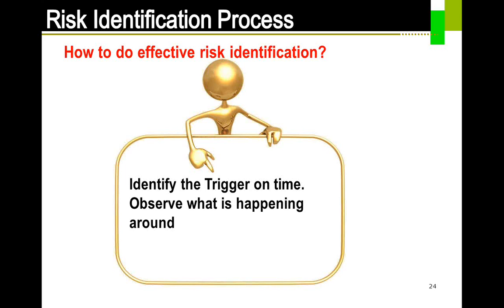What I mean by schedule slippage is, you were supposed to deliver on that Monday, but you slipped by 3-4 days. That's a trigger, which says that, yes, project manager, there is something going wrong. You just need to look at what is happening. Probably that week it may not be a problem.